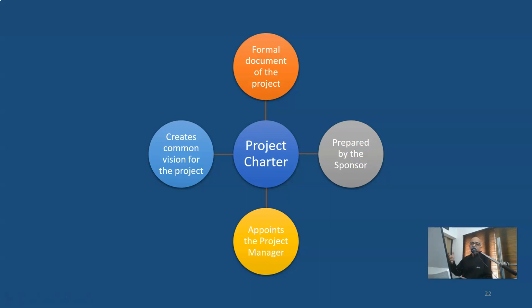Anybody can help the sponsor to create the charter, and very often the designated project manager also can help, because the sponsor can be very high in the hierarchy, can be a very busy person. So the appointed or the designated project manager can help the sponsor to create the charter, but ultimately it is the sponsor who approves the charter, and any changes to the charter must get reapproved by the sponsor.